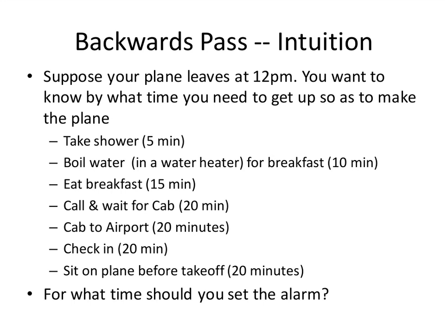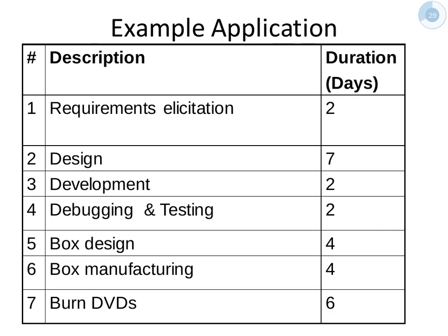It's associated with the minimum, it turns out, of those two. Those things each have to be started, so if those things depend on a previous task, maybe taking a shower is a better example. Taking a shower, then the latest you could finish taking the shower, not delay the whole thing, is the minimum of the latest time you could start eating your breakfast and waiting for the cab. So let's go talk about a practical example of this, and we'll actually diagram it up.